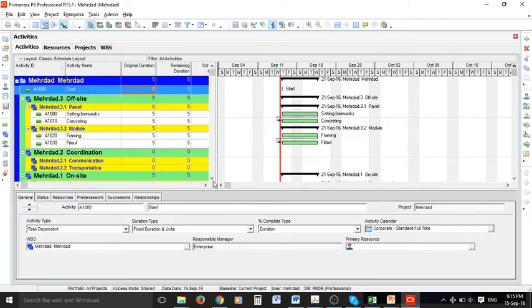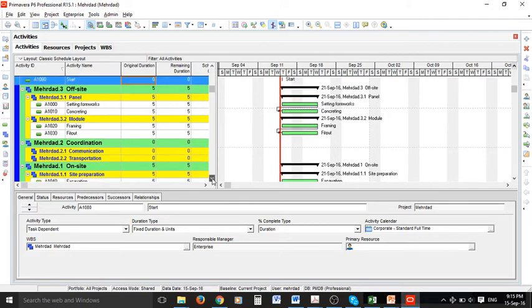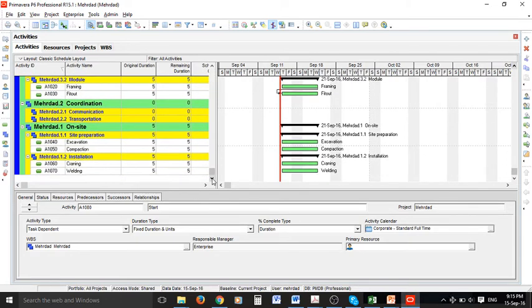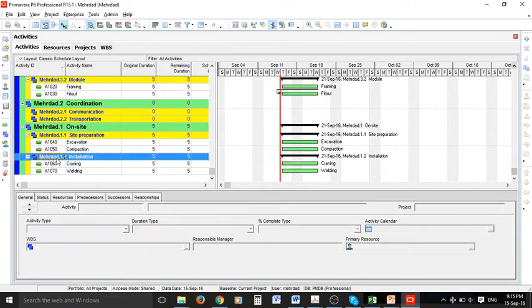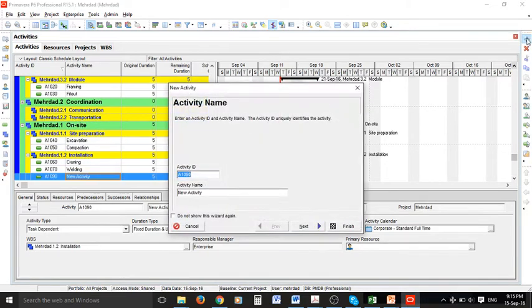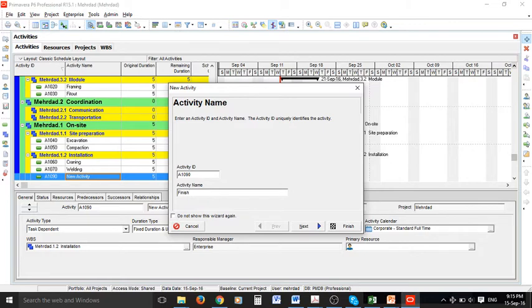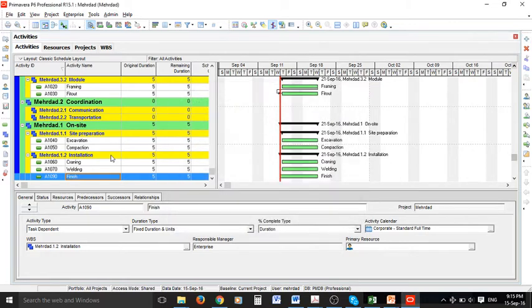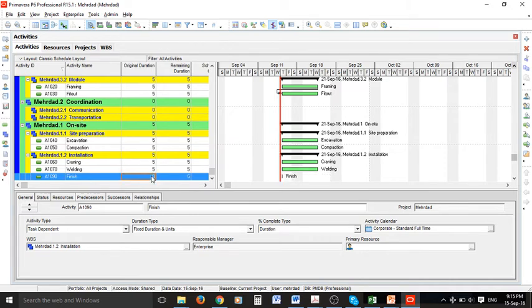Also at the very end when you have completed all the activities you can add a finishing event or milestone and we can name it finish. Again the duration for this one should be zero so it is an event or milestone.